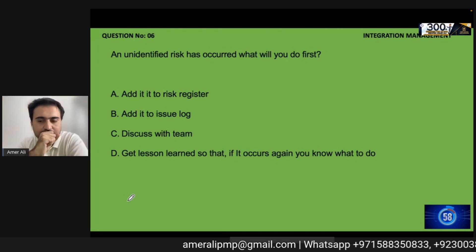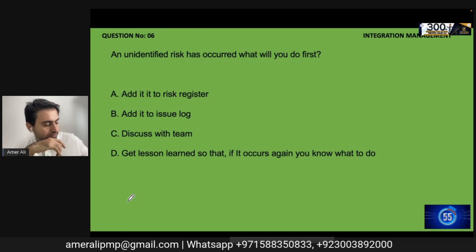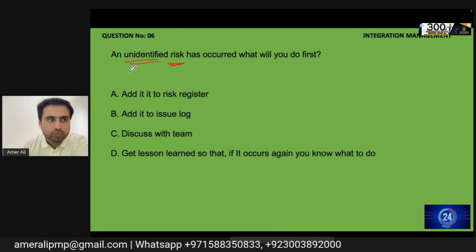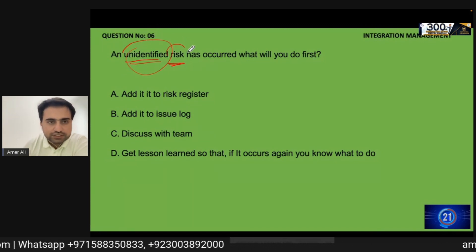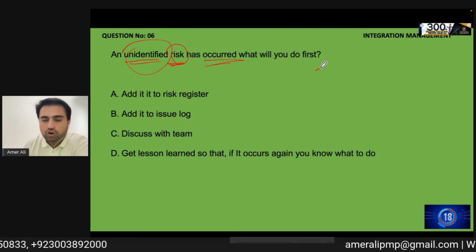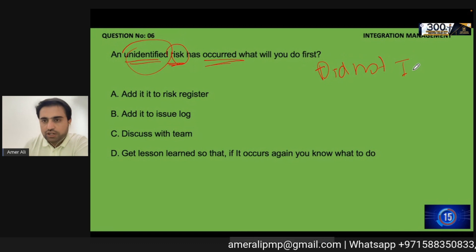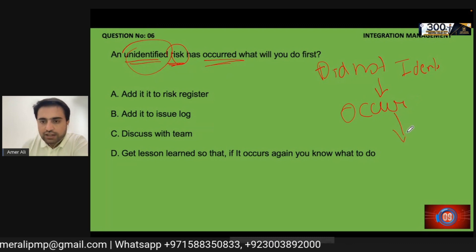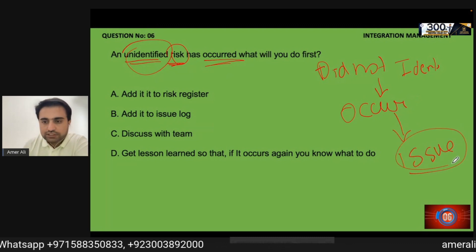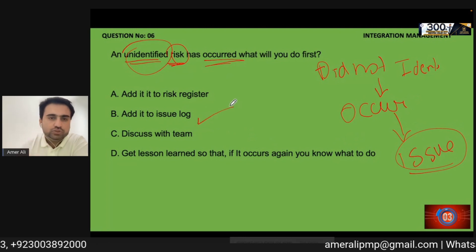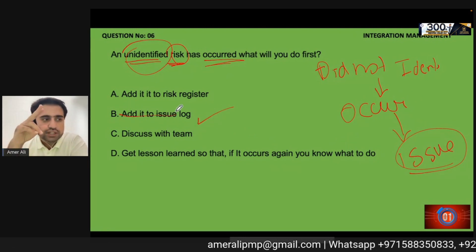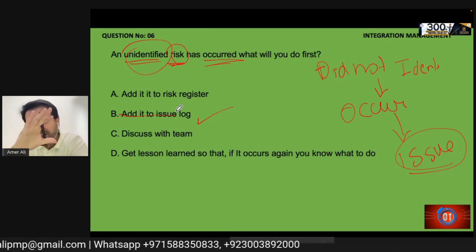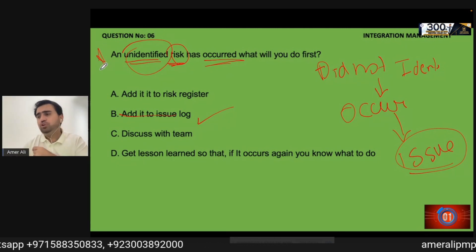An unidentified risk has occurred — something you did not identify has now happened. This is an issue. You add it to the issue log. This is a straight one-liner question that many people get wrong. It is a very critical concept: when an unidentified risk occurs, it becomes an issue and goes into the issue log.